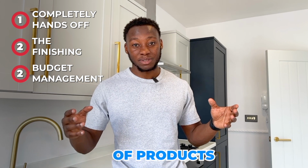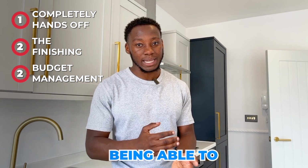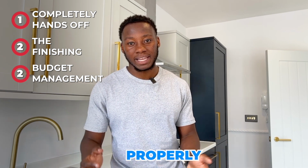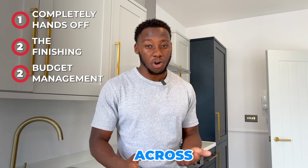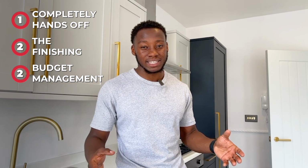Despite going 10% into our contingency, I'm very proud it didn't go any more, because of the types of products and the finishing we were able to achieve within the budget. I was very happy with that. And the key thing to doing that is being able to source our materials properly and ahead of time. Big thanks to my project manager again, who spent time making sure we sourced our products across platforms like Facebook Marketplace, eBay, Amazon, and just using our network to get the best deals for products.